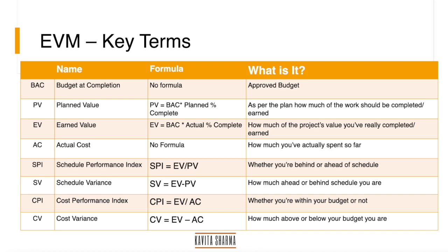The first term is BAC — Budget at Completion. There is no formula for BAC; it is the total budget that senior management has allocated to your project. It is the approved budget, also known as the cost baseline.